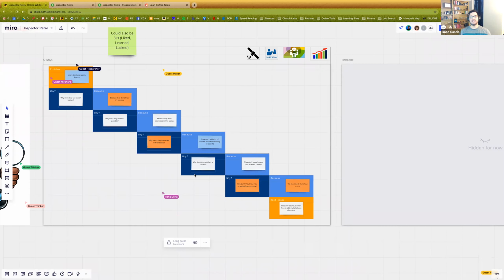The point is, don't just take, I am mad because I didn't get my code checked in time, and then say, okay, we have to fix John getting his code checked in time. Let's do that. And then you're focusing on maybe the wrong thing. Okay, why didn't you get your code checked in time? Well, because I had to update the database schema. Well, why did you have to update the database schema?